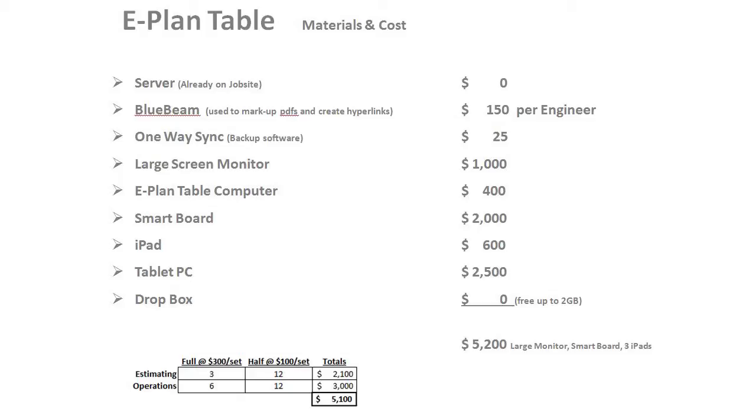And so the typical cost that we're going to see on this is somewhere around the $5,000 range. And just to set up a typical job, and we have an example on the bottom left, just to set it up before we actually get out on the job site, we're going to spend at least $5,000 in documents just in the pre-con phase.